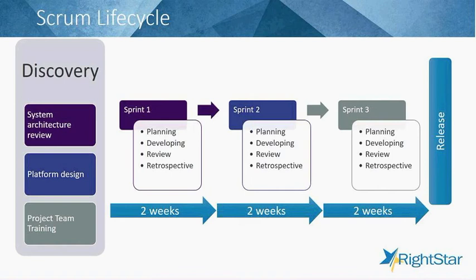Here's an example of the Scrum Lifecycle. If you're working on a development project that uses the Scrum methodology, you'll see that the work is broken down into what we call sprints. So instead of having a large group of requirements up front and then going away for a year and coming back to show the customer, hey, look at this great stuff we built, when presumably over the year it took to develop, their requirements probably changed.